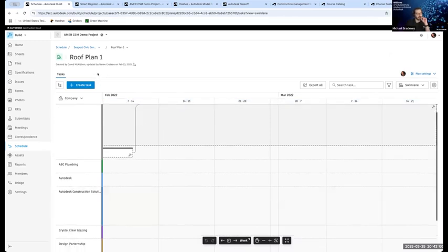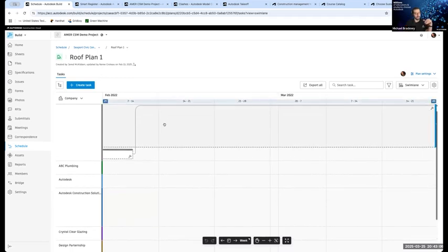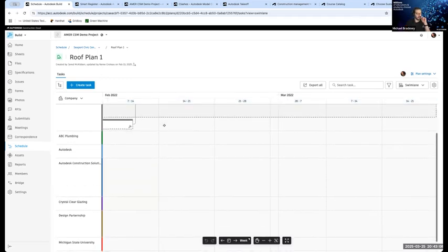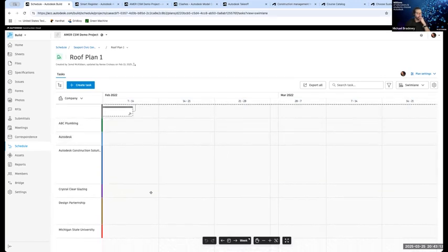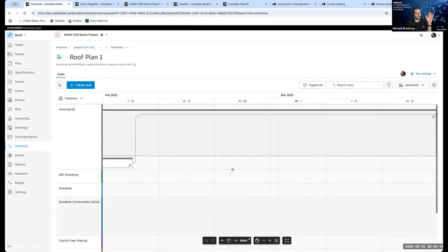And we have some pull planning type stuff, so we can take different chunks of that master plan to then break down into specific activities and who the folks are, and build that out in here for a shorter duration. So you can have your different swim lanes in here and create different tasks. So that's something that you can actually create in here. But again, it's more just trying to figure out some of the details for the short term items that are ahead of you in your schedule.